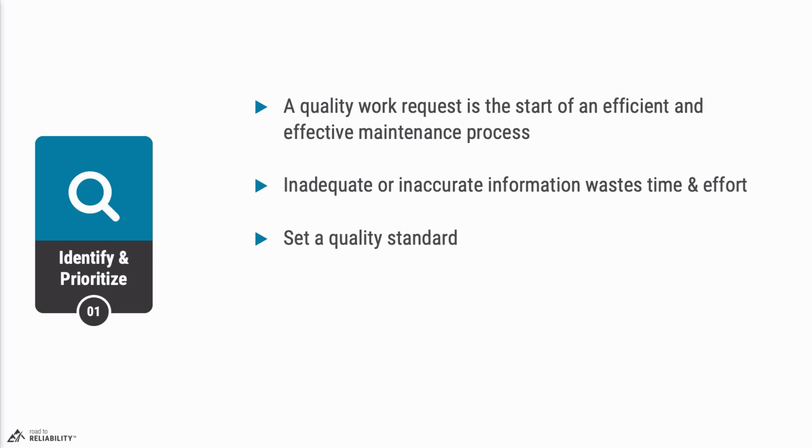And you need to use this step as a gate and conduct a quality check, in effect, to see that new work requests as they are raised are detailed and accurate enough to let them pass through. And a good way to do that is to agree as an organization on a basic quality standard. What needs to be in there and to what level of detail, and then make sure that all your new work requests are reviewed against that standard. And if they don't meet the quality standard, they need to be corrected.